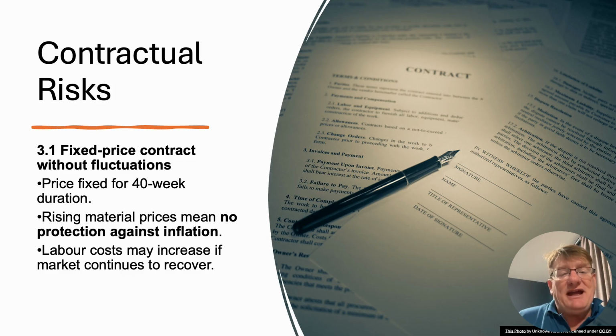So it would depend, obviously, on what contract you use as well, because different contracts will have different risks. NEC spreads the risk between all parties, subcontractor, contractor and client. So therefore it is a much better, if you like, a less risk-averse contract. The JCTs, particularly not the design and build, so the more traditional setups with quantities or without quantities, are much more adversarial in nature, less partnering.